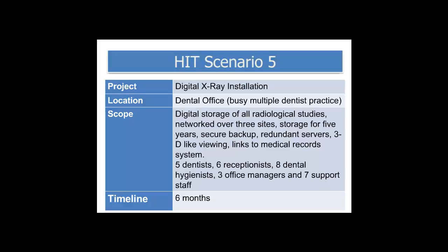Because there is no one at any of these offices that has the knowledge base for this particular software implementation, it was decided that the offices would use a consultant that specialized in this particular dental installation. That consultant will help guide you not only on the security aspects and the disaster recovery, but also on the hardware and the loading of the software. And then they will also give you either test plans, or they will help you create test plans so that you can test the system to its fullest.